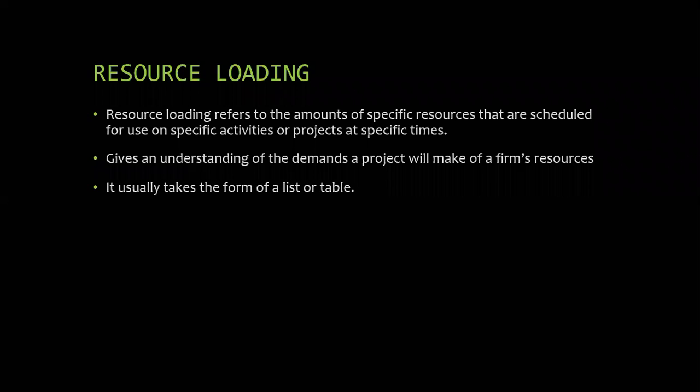If the leveling work is over and the JCB's task is completed, immediately that JCB should be shifted to another project, another work, where that particular work requires the JCB. So when you allocate the JCB, you should provide resources to project one, project two properly, so that the JCB idle time will be reduced.